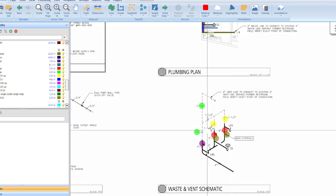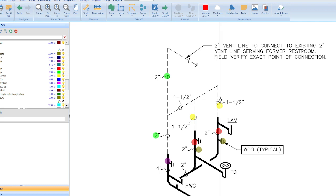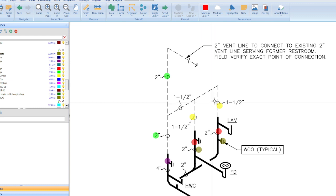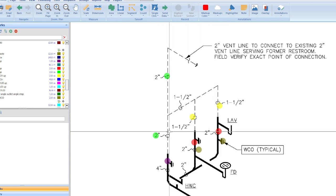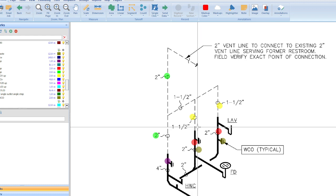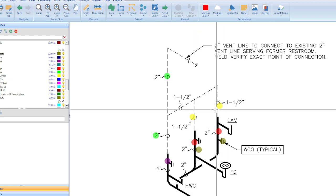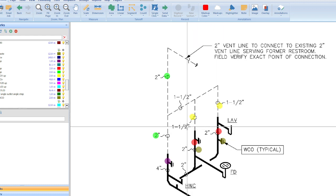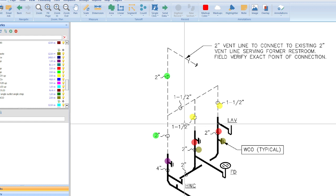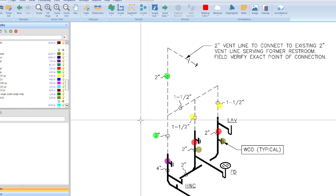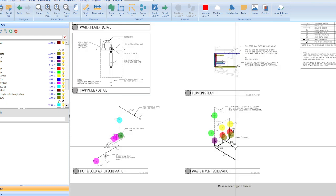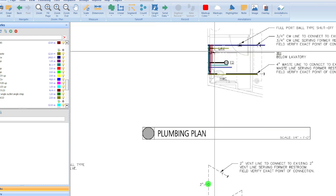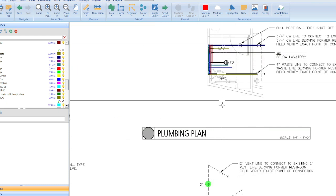This was the takeoff where we looked at the riser diagram and got all of the vertical measures. We count how many locations up, and my rule of thumb is 10 feet. So for every location I've counted, that's why I dotted. So it's like this up, that up, one and a half inch up, and this is vent. So we have two one and a half inch vent up. So I would give that 20 feet of vent up.